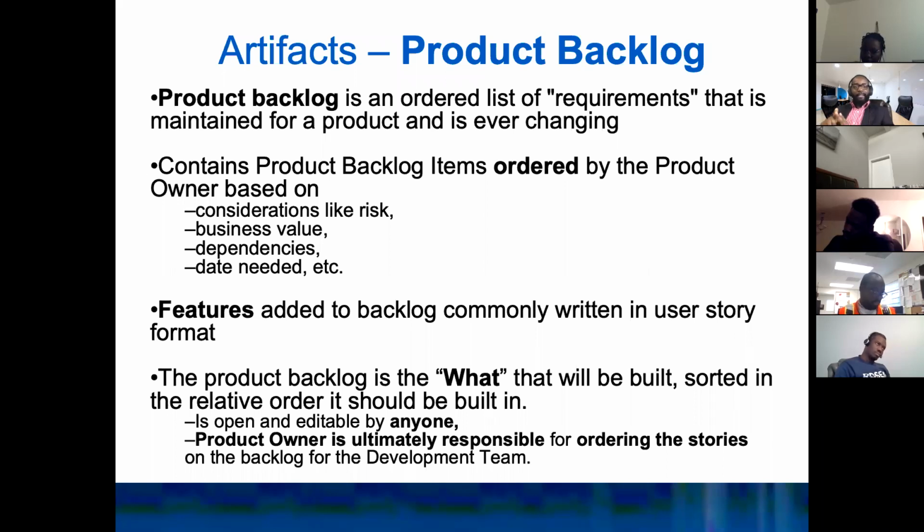If they talk to the product owner, they can add stuff in there, but the whole product backlog is owned and managed by the product owner. So the main person who adds things into the product backlog is the product owner. But if not, the dev team can add stuff in there, with the approval of the product owner.